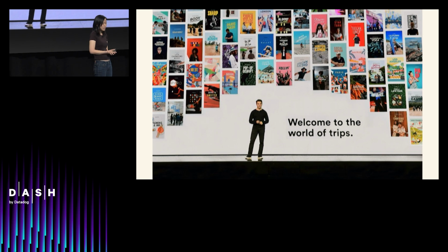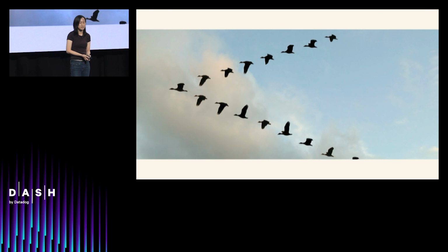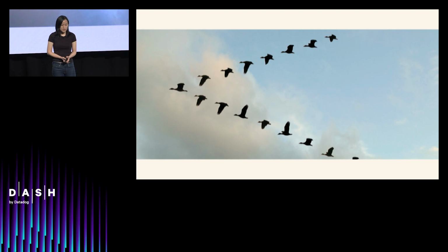And we realized that the first thing we had to do was to get alignment, based on our learnings from the first SOA attempt. SOA isn't just an engineering specification. It really meant for us a new way of doing product development. And so we needed to get all the product stakeholders on board. This would include product, engineering, design, data science. We all needed to understand why we had to move to SOA, and how it would help the business.